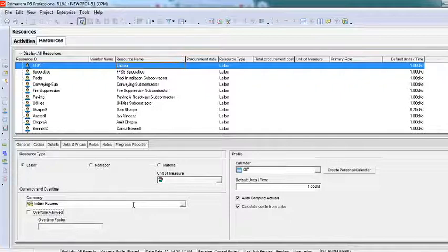there will be no extra cost paid. I'll repeat. Now this GIT is a calendar which has 9 hours per day. When I add a mason for this activity, he'll work for 9 hours. Assume in the actuals you make him work for 10 or 11 hours instead of 9. Now for the extra 2 hours you have made him work, there will be no cost added by default in your software, because you have told it no overtime.